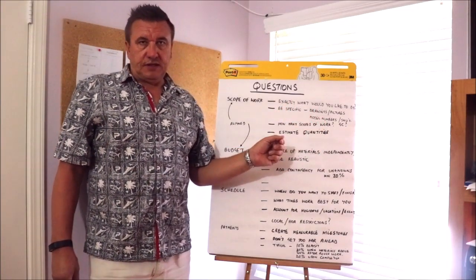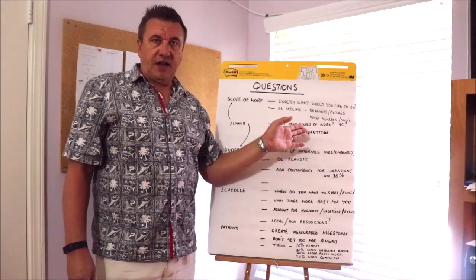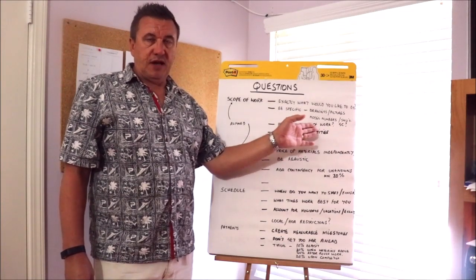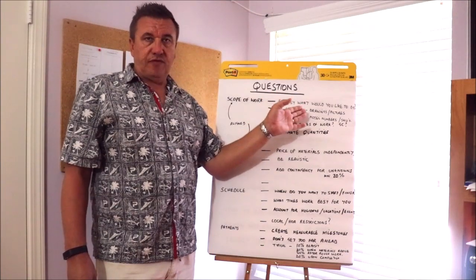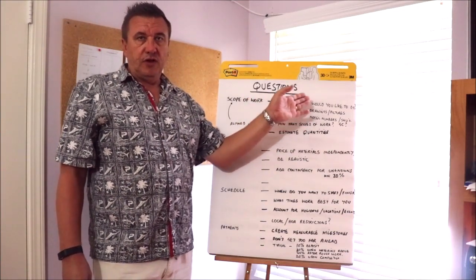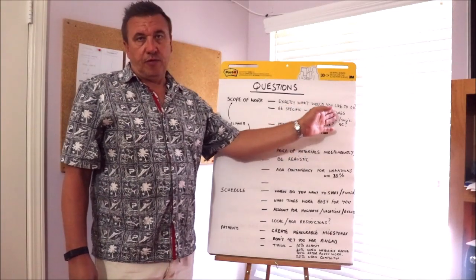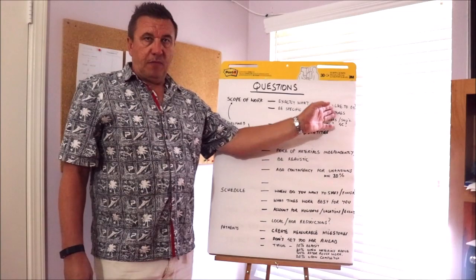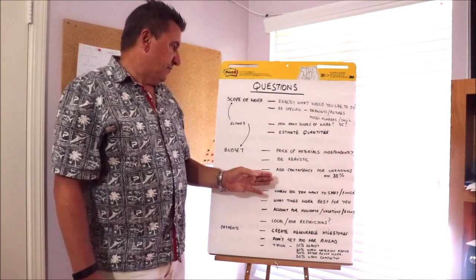Estimate some quantities. If you're putting new carpet down, instead of having 6 different guys traipsing around your house with a tape measure, go ahead and get a tape measure and measure it out. Then you can say in the scope of work, I want 126 square feet of carpet taken up, removed, a new carpet pad, and new carpet SKU number X from Home Depot. Easy, and it saves you a lot of hassle making appointments with people to come around to your house.